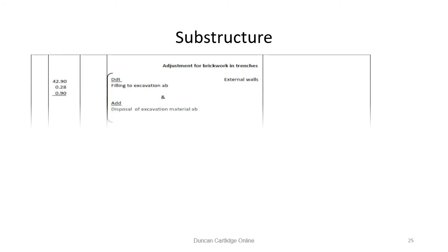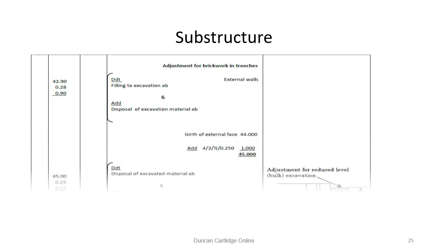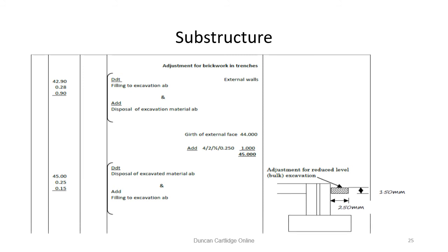We must now make some adjustments to the backfill and removal of spoil. The first item on this page is an adjustment for the masonry in the trench to the filling measured on page 15. In addition, a strip of reduced level excavation measured on page 14 must be reinstated. To do this, the centre line of the strip has to be calculated as shown here.